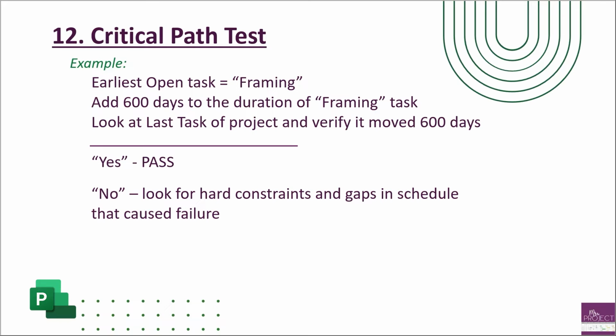It just is saying that there's something broken. There's some kind of constraint, or there's gaps where you didn't link something appropriately. Your critical path should always be something that's open right now and is happening now. There could be something broken where a task is missing, where you veered off into 3 paths and then went back to 1, and then the main driver. You've got something that's not linked right.